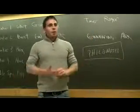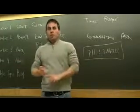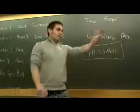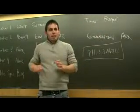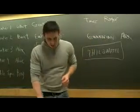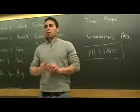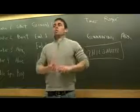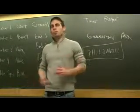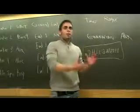And the last part of any project is obviously the end, the closing part. This is where you deliver the final result. You finalize all activities so that you don't just have one team member continuing to scribble away at his desk for the next 3 weeks, even though the project's over and everybody's gone home. And you go back over the project with all the personnel involved. By doing that, you'll be able to document lessons learned. What did you do well? What could use improvement? And when we start the next project, how are we going to do an even better job?